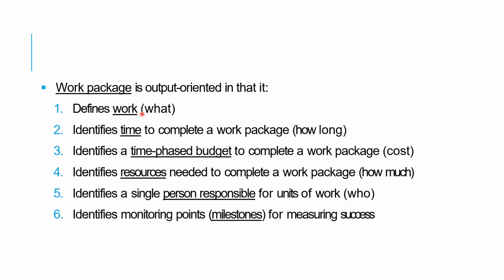Okay, a work package is output oriented in that it defines the work, what; the time, how long it is going to take, and the time phase; the budget, cost, resources, how much; and ideally a single person, who, with multiple milestones.